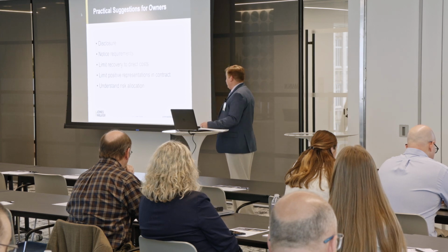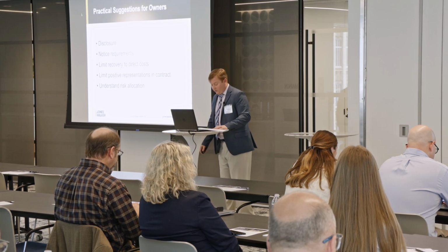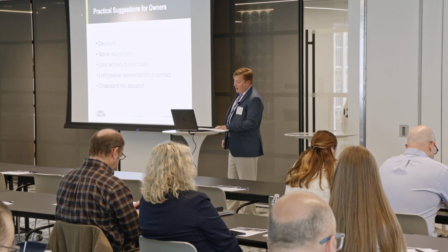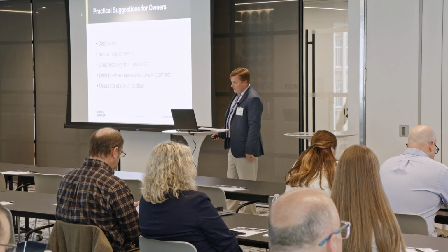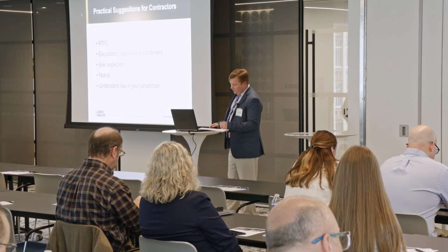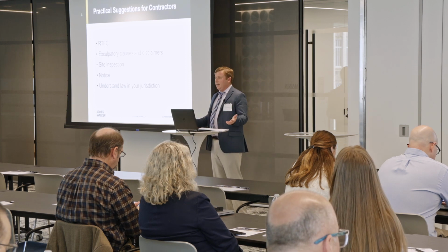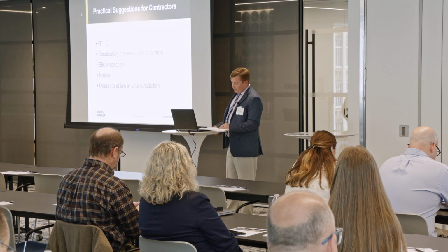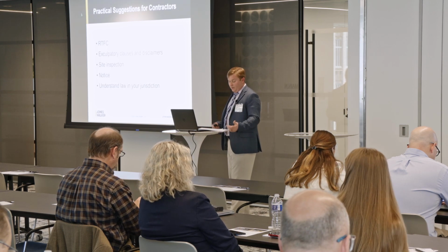And then obvious maybe, but you should be certain before letting the contract to know how the contract allocates the risk of both unknown and different site conditions. So for the contractors, again, first, carefully review contract documents. And again, it's not just the contract. We're all aware of that. It's everything that's in the solicitation. And make sure you understand the risk allocation between you and the owner. I would look for onerous exculpatory clauses and disclaimers about geotechnical data being provided.